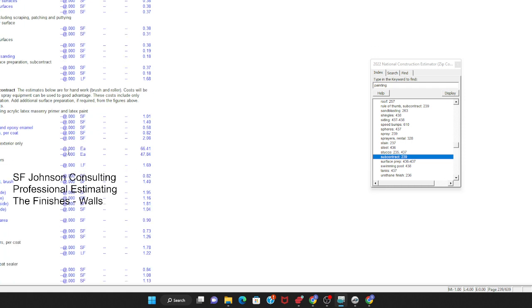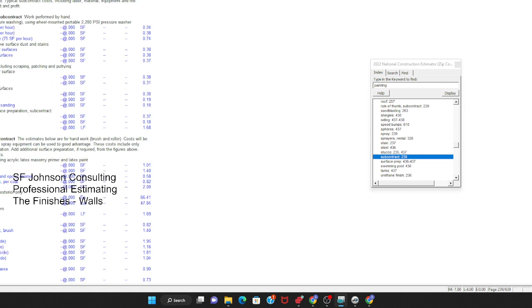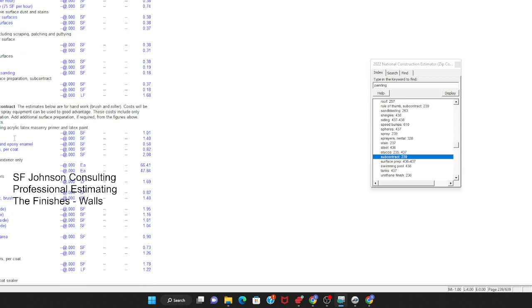Existing walls. In that demo portion, definitely could use that. Light cleaning, scraping, patching. See, and I use 25 cents per square foot. See, I cheated myself. But it's okay. Oh wait, no, ours was gypsum, so it's somewhere between 18 and for patching. Okay, existing. That's why you get a cost book. It's a no-brainer. You ain't got to think. Just got to know how to read it.